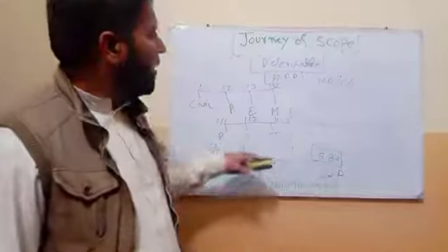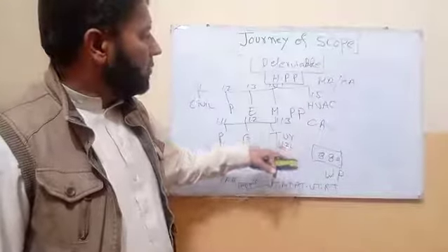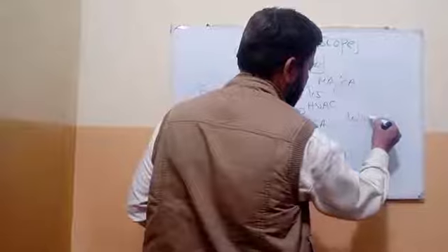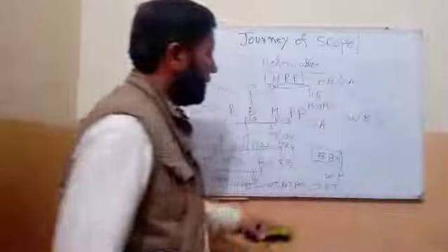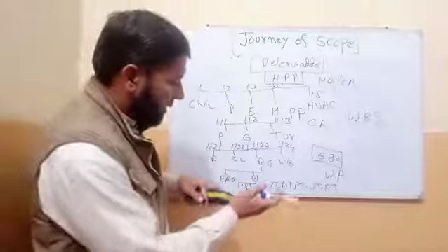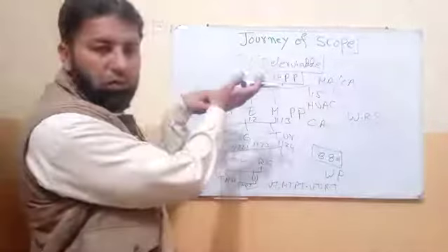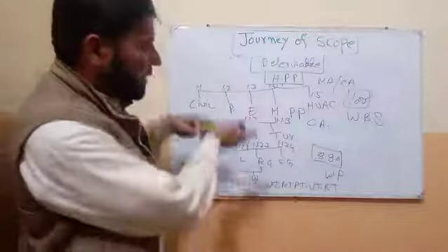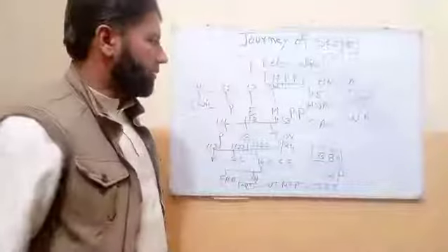And the thumb rule of WBS: the whole structure we call the work breakdown structure. The thumb rule of the work breakdown structure is that when we add from bottom to top, we should get 100% of the work.